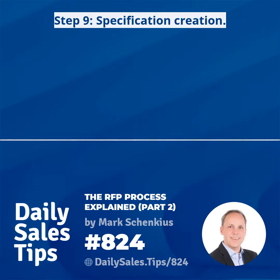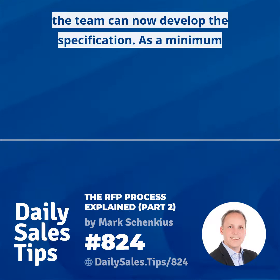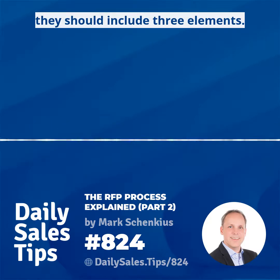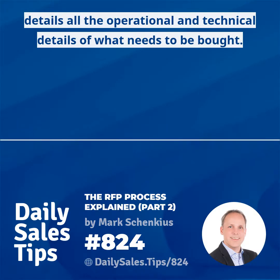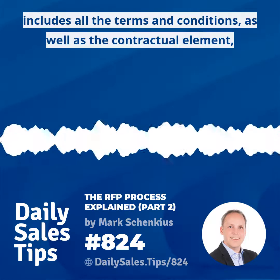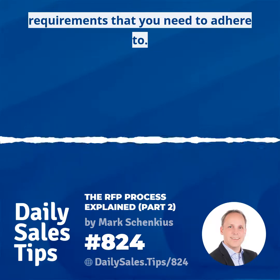Step 9. Specification creation. As soon as a time plan has been created, the team can now develop the specification. As a minimum, this should include 3 elements. 1. A technical specification, which details all the operational and technical details of what needs to be bought. 2. A commercial specification that includes all the terms and conditions as well as the contractual element. And 3. A quality specification, which focuses on all the specific quality requirements that you need to adhere to.